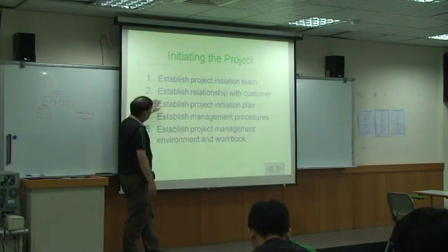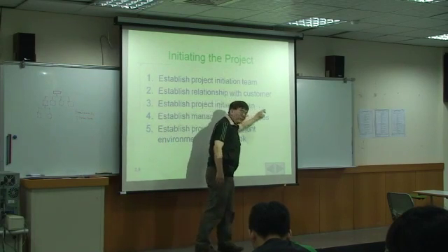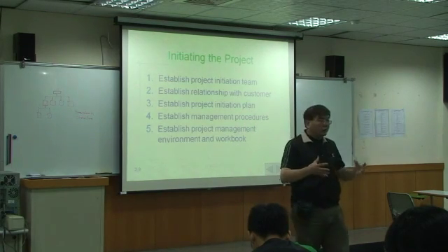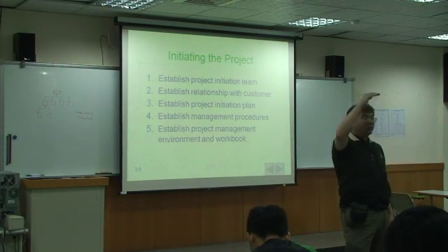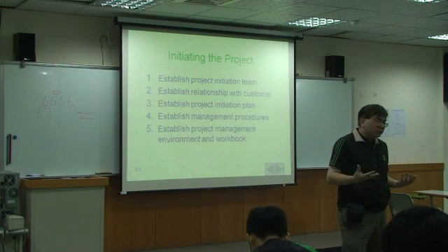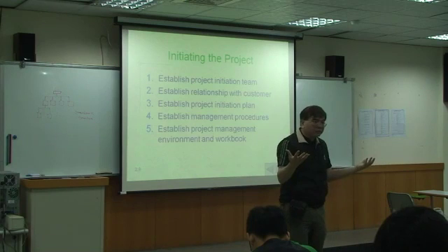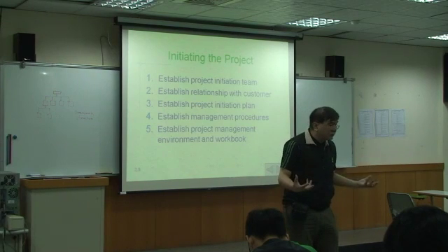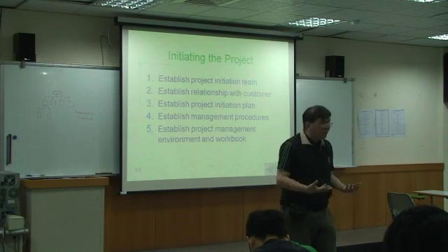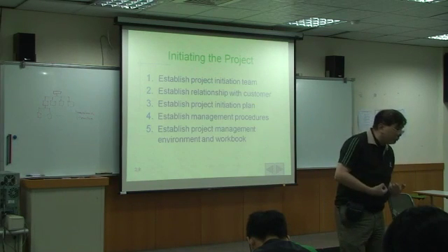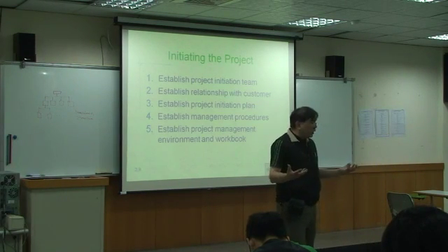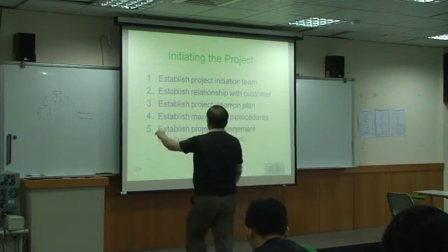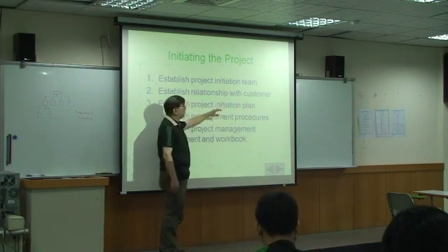Number 3. Establish project initialization plan. This means we must create a charter. You remember, for the charter, we must say who created this project, the project target, the project scope, the project acceptance plan, the project exclusions or inclusions, and the project constraints. So this means we must create a project charter in step 3.